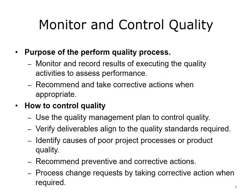Monitoring and controlling extends to the quality of the project's deliverable outcomes. By monitoring and recording the results of all quality activities, you can assess your team's performance and take corrective actions when necessary. Ensure that your team designs quality control into their processes and products so that all specifications are met and the customer doesn't experience defects and bugs. Checking these things at the end of the project cycle will probably require additional rework, money, and resources. The quality management plan details how quality control should be performed throughout the project. Verify deliverables and make sure they align to the quality standards. Identify causes of poor process or product quality. Recommend and implement preventive and corrective actions.